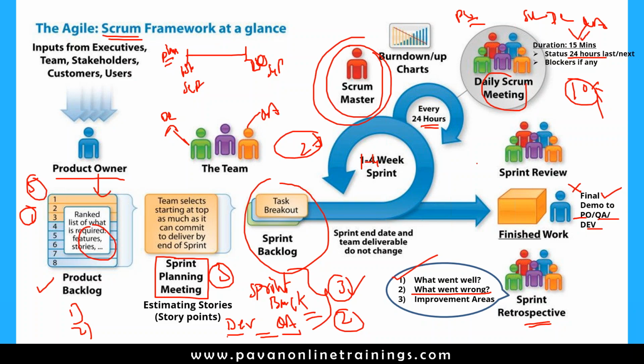Once the sprint is completed, they need some metrics, like how much effort and how much estimation we did before, and after completion of the sprint, whether we achieved it correctly, whether we did the correct estimation, or whether we took more time or completed within less time. So how will they know? By using these charts, burn down and velocity charts, there are some metrics we have.